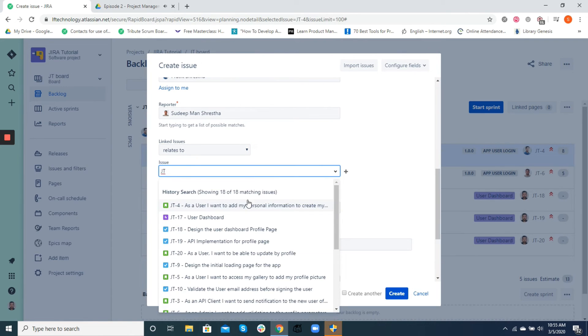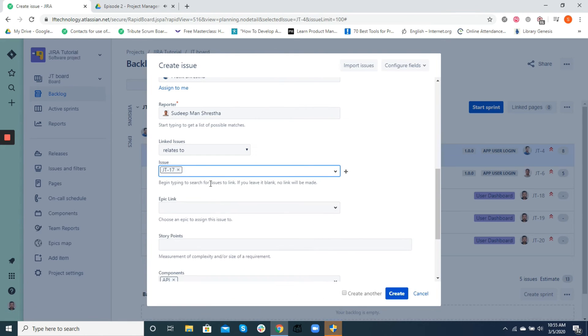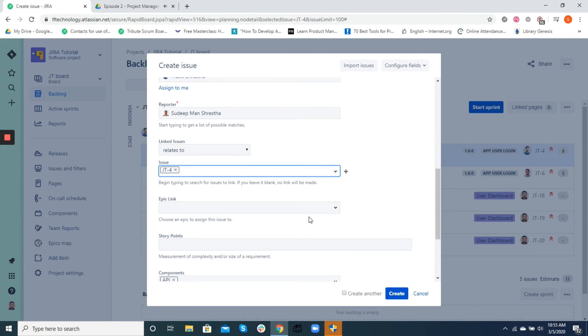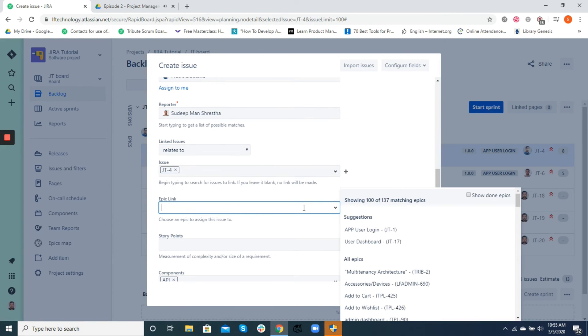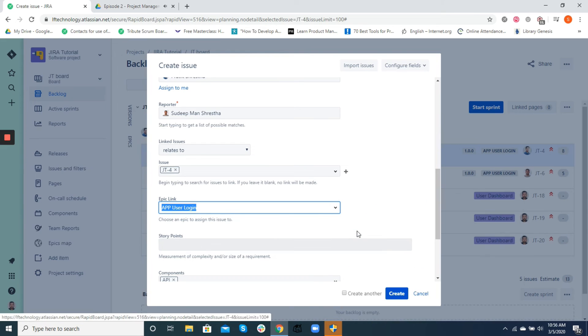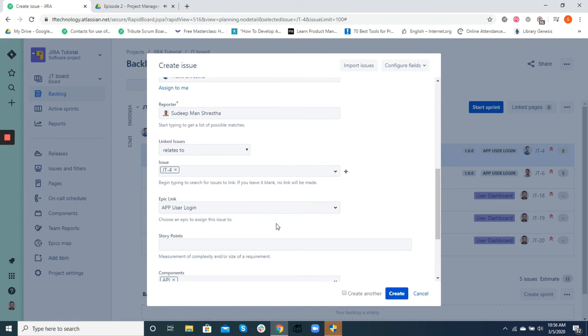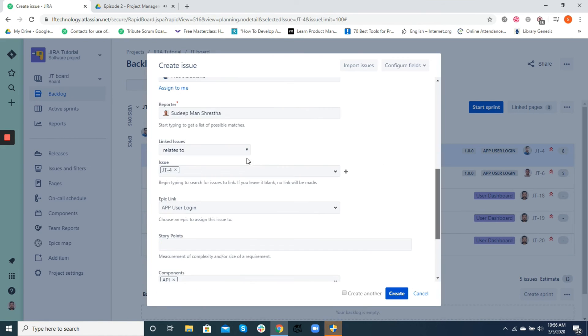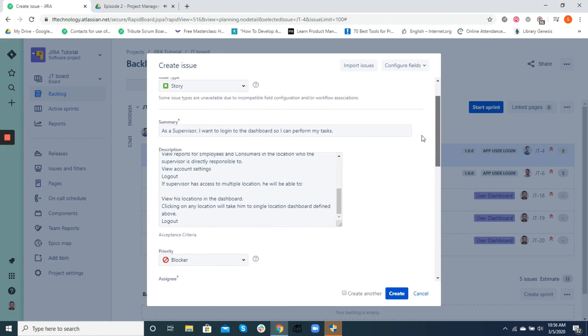When there are several user stories and tasks associated with an epic, we link those stories and tasks to an epic. For example, if a user login is an epic, all user stories associated with login will be linked to that epic. It only helps to visualize the tasks better and improves the tracking of the roadmap at an epic level.